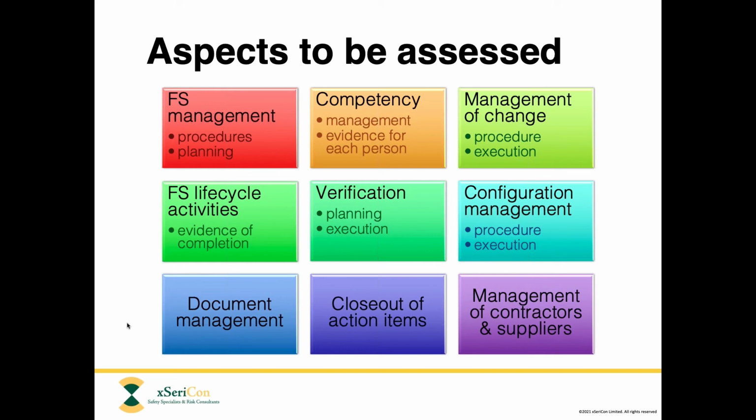So as I already explained, verification is supposed to be a review of the output from each life cycle activity. So we would like to see that you have a plan to execute verification in a proper way that meets the requirements and expectations of the standard. And we would like to see that you're actually executing that plan. And preferably you're doing it in a timely manner. So as soon as each activity is completed, it should be verified immediately.